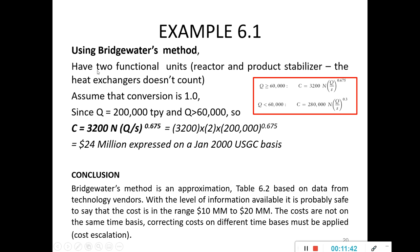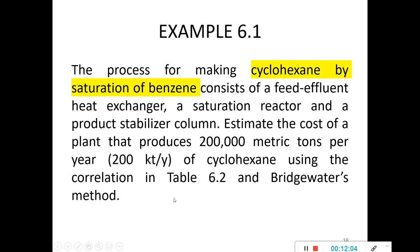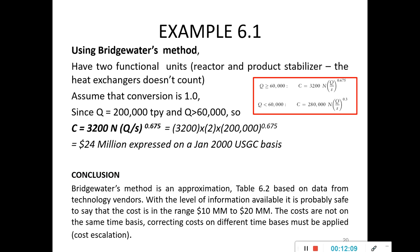Using the Bridgewater method for the same example, we have only two functional units: the reactor and the product stabilizer. The heat exchanger is not counted as it is not considered a substantial cost unless mentioned otherwise. Assume conversion is 1. Since Q is 200,000 metric tons per year, which is more than 60,000, we use the corresponding equation and substitute all values. With S equal to 1, we get 24 million expressed on a January 2000 USD basis. This is the correct way to write cost estimates — always include the year basis.